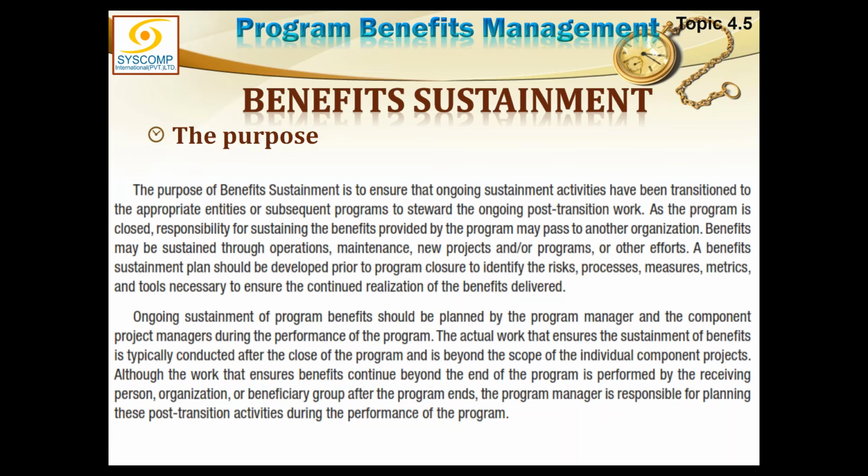If the sustainment is continuous, even if the program manager is no more there and the program has been closed, there are official departments responsible for sustenance. Like the Planning Commission of Pakistan, that is responsible for all the program sustenance, or whatever they want to call it. I don't know, they don't even call it a program, but they have a sustenance mechanism. After every 5 years, you have to submit a report about this project or program to them, and that is a sustenance requirement, and they will ensure that some value has been generated.